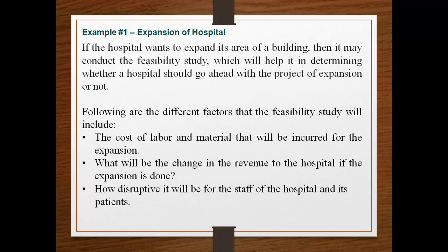First, if I am expanding the hospital, the cost of labor and material has to be considered, because that is going to be incurred at the time of expansion. What will be the change in the revenue of the hospital if the expansion is done? If I am expanding, what will it benefit me? Will my current revenue go up by a 10% hike, or will it double? That has to be found out.